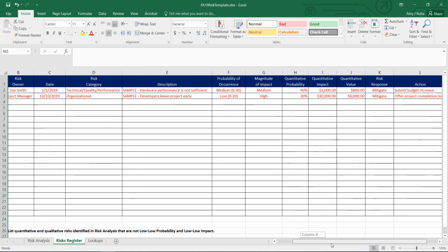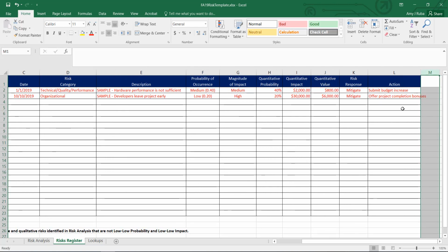We have identified the action of offering project completion bonuses as a way that we plan to mitigate the probability of the risk occurring. By offering a project completion bonus, we are encouraging the project members not to leave the project early. I hope this video has given you a good overview of how you can create a risk analysis and a risk register for your